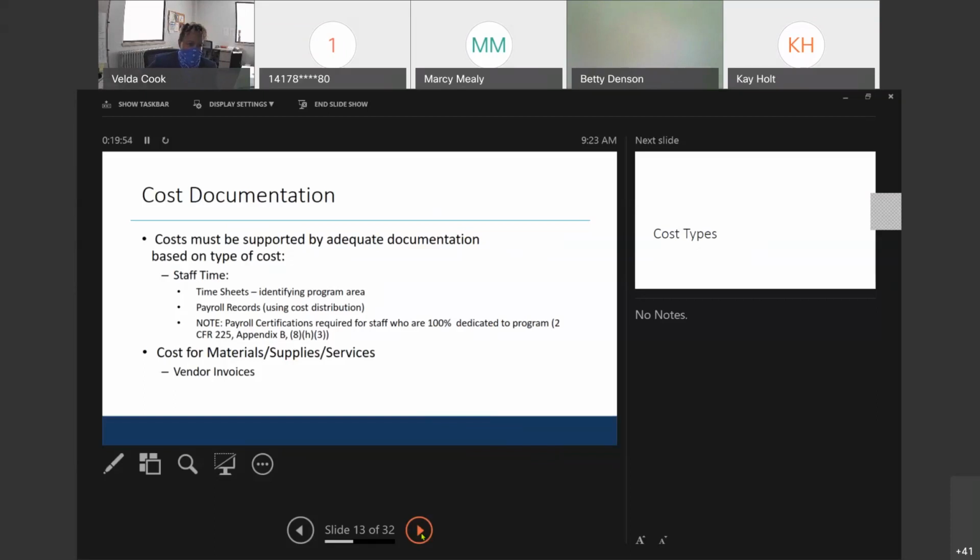So if you are a contractor and you have been procured competitively, then in your contract, you're going to build these type of costs with overhead and profit, and you're going to design your contract to reflect how that will be invoiced. You will want to develop that so that you are focusing on the deliverables that you will produce in order for that activity to be performed and for that activity to be a completed project and to serve the beneficiaries as stated in the application.